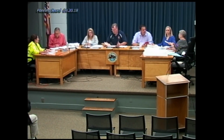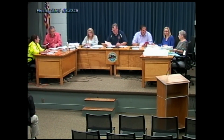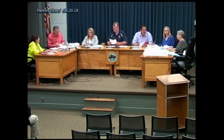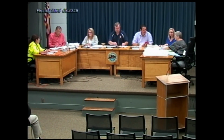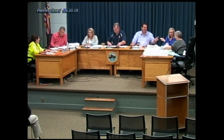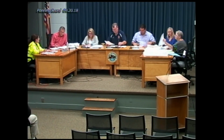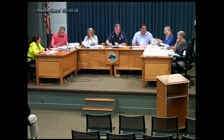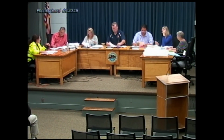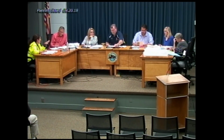Lost Brook. Oh, this is to Rick. All right. So we're not doing anything with this, right? The subdivision plan that was signed shows gravity sewer. And instead of doing gravity sewer, they want to do two individual force mains. Basically, I told them, they came in as if they were going to just go and build it, and I told them, you have to figure out whether they have to modify the approved subdivision plan. And plus, their O&M documents reflect the plan that was approved that has a single gravity main, not the force mains. So I think they've got to go to the Sewer and Water Commission.